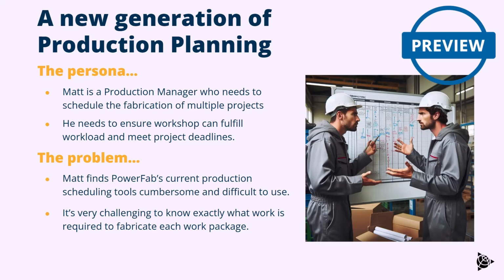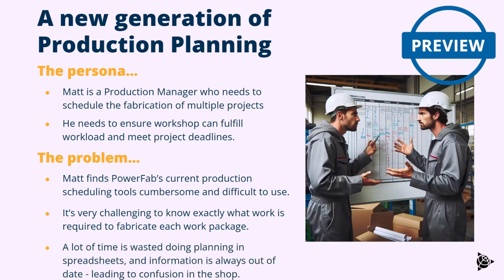So how much needs to be cut versus welded versus painted, for example. And ultimately they resort to doing all the planning manually, whether that's in spreadsheets or on a whiteboard. This becomes out of date as soon as it's published, and as a result this leads to confusion on the shop floor as to what should be done and when.